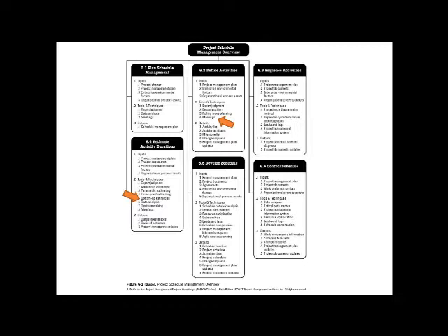Bottom-up estimating. Estimate activity durations wasn't in there before, which was a bit of a miss. So now they've covered off that gap. They've put it in there. So is basis of estimates. You'll see basis of estimates not just come up in cost management, but in estimate activity durations, estimate activity effort, and finally the estimate resource effort, and I forget the name of the process, to tell you the truth, and the cost management area as well.